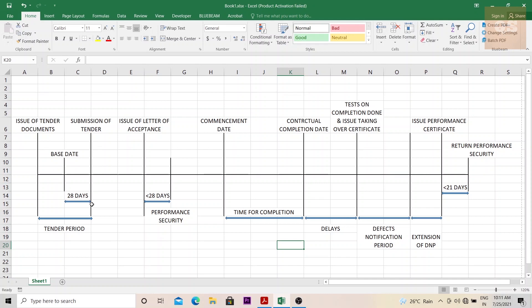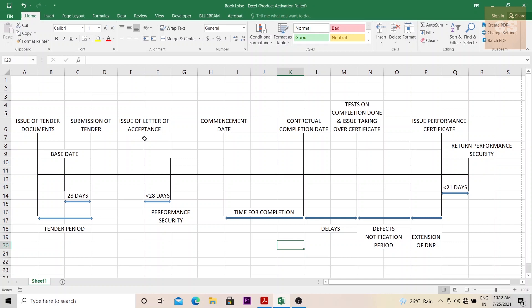Once the submission of tender is done, there is a time gap where the employer will go through all the quotes, do negotiations, and finally a contractor is selected to carry out this project. And to this contractor, a letter of acceptance is issued. This is basically a formal letter mentioning that they are awarding this contract to this particular contractor. Based on the quotations and after the negotiations, an amount will be finalized between this contractor and the employer, and all this amount and the date to be completed, the completion date, all these details will be mentioned in this letter of acceptance.